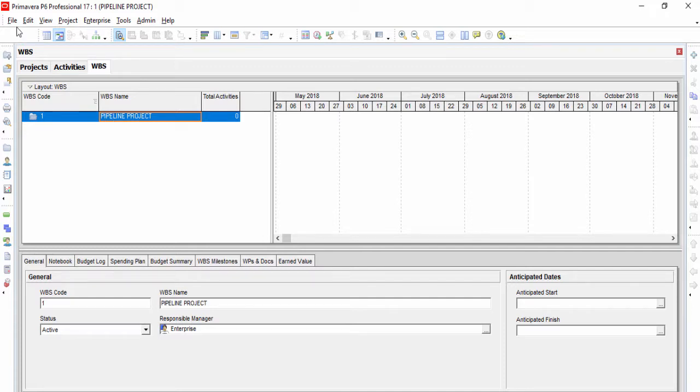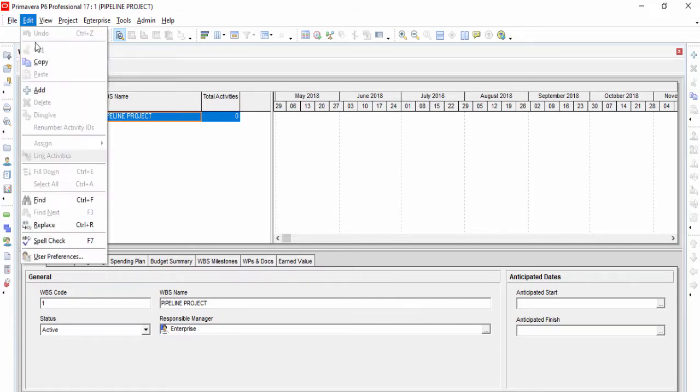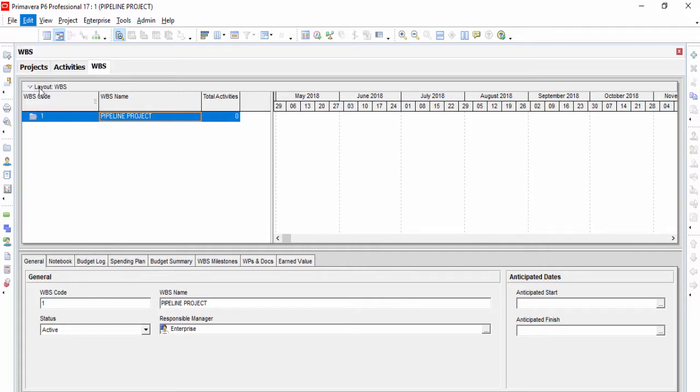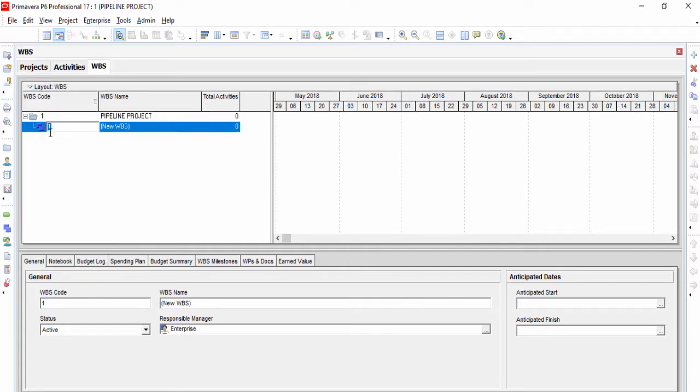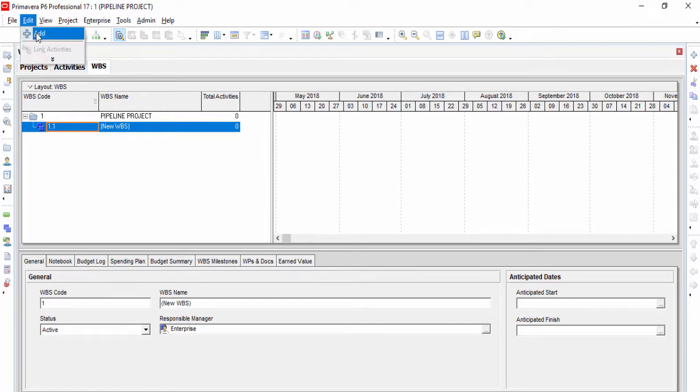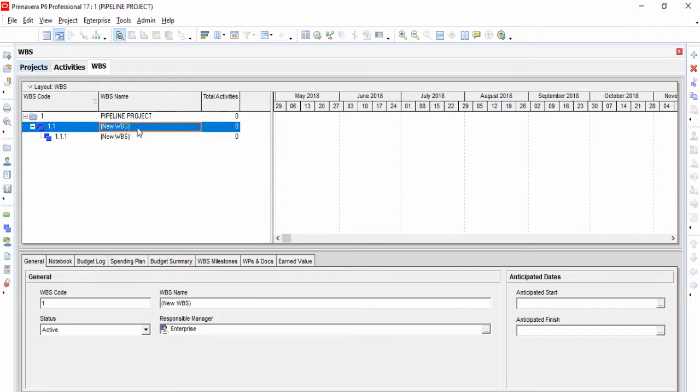Now we will insert the work breakdown structure names and codes of each work breakdown structure level of our pipeline project. Select Edit, Add from the main dropdown menu at the top of the screen. This will create a child of the pipeline project.